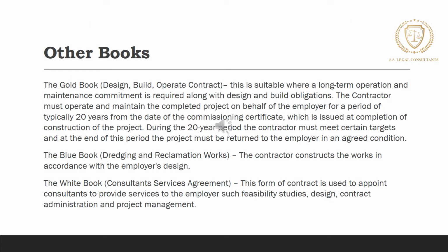And there are other books, which is the Gold Book, the conditions of contract for design, build and operate projects. It is suitable where a long-term operation and maintenance commitment is required along with the design and building obligations. For example, the contractor must operate and maintain the completed project on behalf of the employer for a